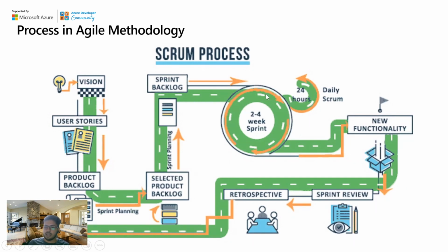But it's not like after every employee or every team has been assigned a work item, they meet up again after 15 days or a month. Over here, there is a daily scrum call. And in this daily scrum call, everything is discussed. The scrum master, who supervises the complete sprint, follows up with each individual person who has been assigned a task, whether the task has progressed or there is any sort of blocker and things like that.